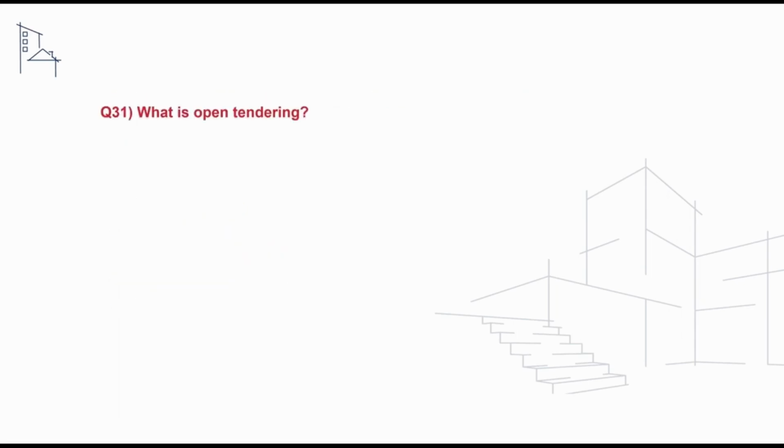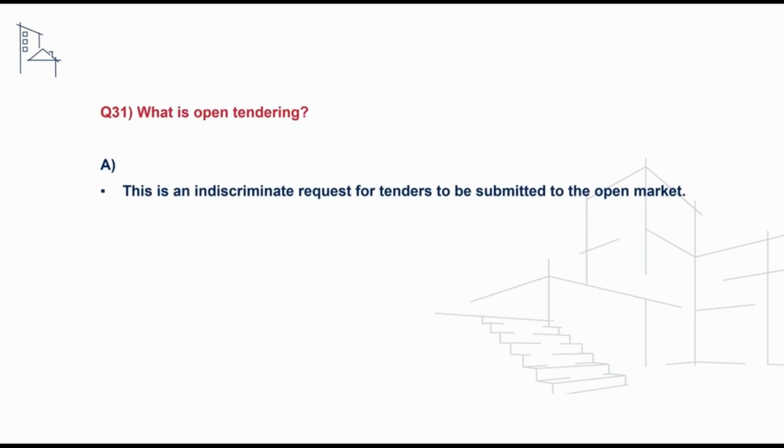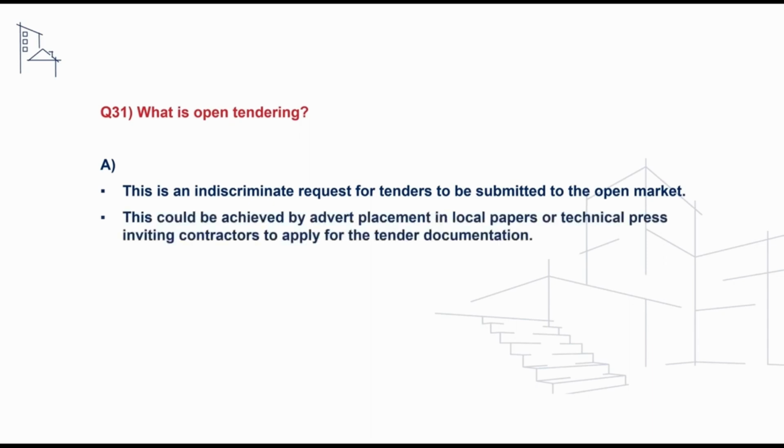Another question candidates may receive is what is open tendering? And to address this, we can say that this is an indiscriminate request for tenders to be submitted to the open market. This could be achieved by an advert being placed in local papers or technical press, inviting contractors to apply for the tender documentation. There are little or no barriers to entry needed to submit a tender.